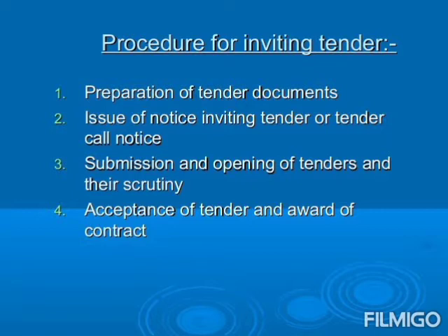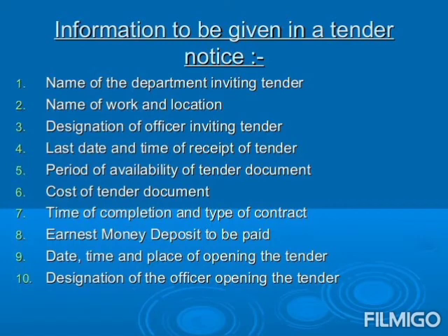Information to be given in a tender notice. First, name of the department inviting the particular tender. Second, name of the work and the location. Third, designation of officer inviting the particular tender. Fourth, last date and time of receipt of tender. Five, period of availability of tender document. 6. Cost of tender document.